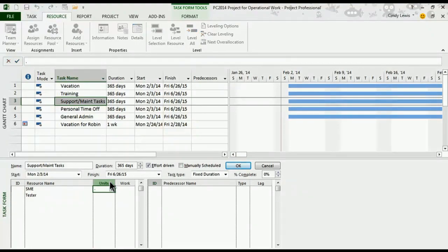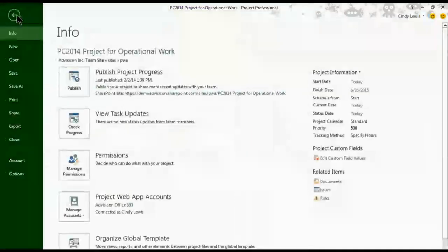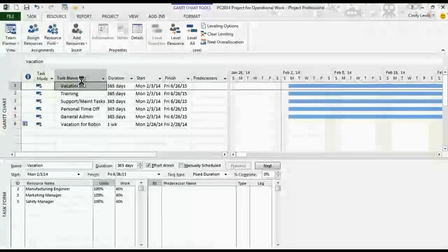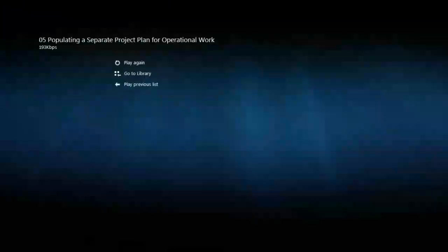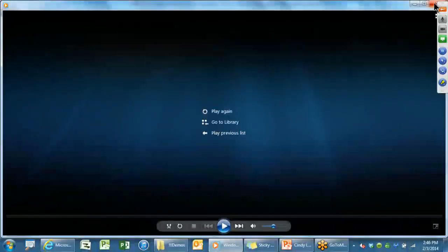You'll see I'm adding in different approaches. You can put in percentage amounts, and it'll calculate hours. You can put in hours, and it'll calculate percentage. Really, there are many different ways to do this. It's up to you, your best approach. So I think I've got most of that data entered that we can see. Obviously, I need to publish that. We just learned how important that was. And while that's publishing, this is going to give us some great output into the Resource Center. So let me show you that one next.